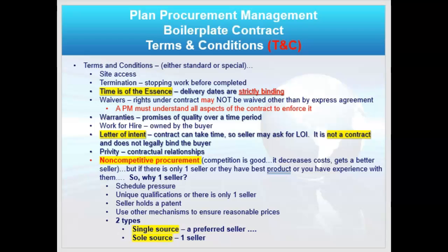Time is of the essence. As a project manager, I love that because it says delivery dates are strictly binding. It's a legal term that the courts will recognize. If this contract is on my critical path, you can bet I want to slide in terms and conditions. Talk to your procurement manager. Slide in time is of the essence and define it.